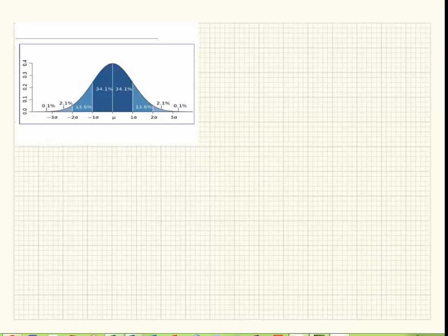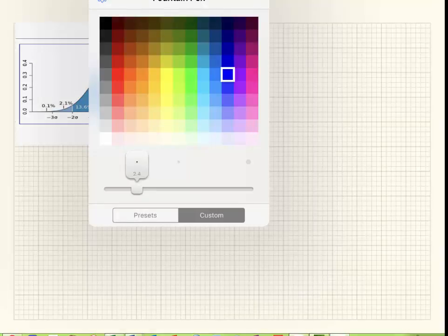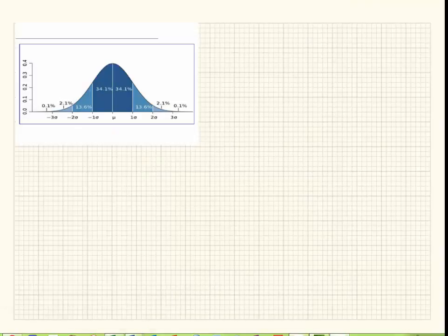Okay, so this is a concept that applies to the normal distribution. It's very important. It comes up many times in this class. If you're relatively familiar with it, this will make enough sense for you. So what I'm going to start with is you're looking at a normal distribution that's got some key identifiers on it. So we're going to start with mu here, and we're going to note that mu is the mean, always. But for our project, we found our mean to be 14 weeks. On average, we expect our project to take 14 weeks.